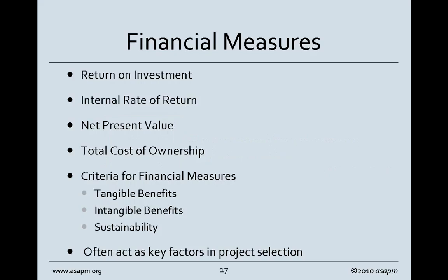Success can be looked at not only as did we achieve what the customer wants, but from the view of the supplier, did we actually get the return that we were looking for when we invested in it. So there are several ways to look at it. Of these financial measures, we can look at internal rate of return, basically how well is that dollar working in terms of our investment, or net present value, how much money did we actually make? These financial measures can help us determine whether or not we achieved success.